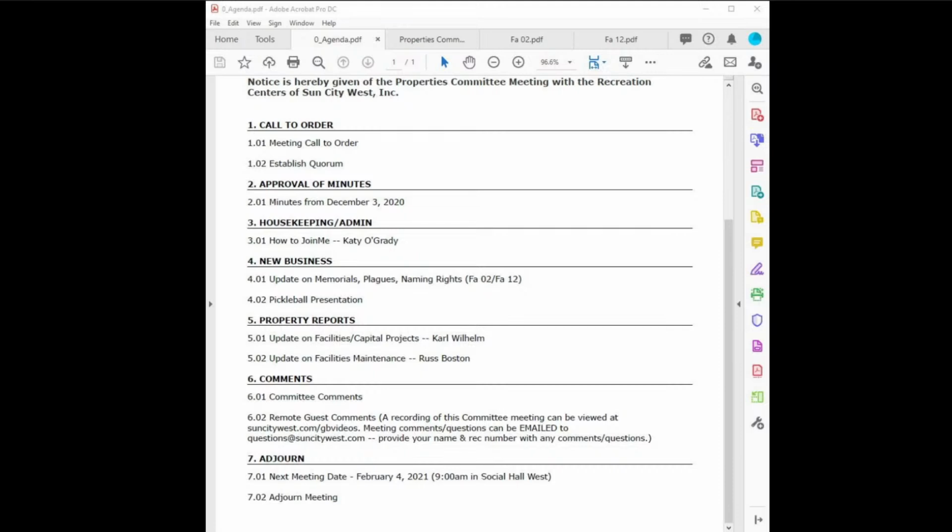Remember, the guidelines are for turning dollar amounts into the budget, so that a dollar amount has been proposed to the budget, given to the CFO by the appropriate timeline. That dollar amount can be erased or negated by these conversations that come to the property, chartered clubs, budget and finance. You give your recommendations to the governing board, and then the governing board makes a decision on whether those funds stay in the budget and get approved towards the end of the year. And then next year.